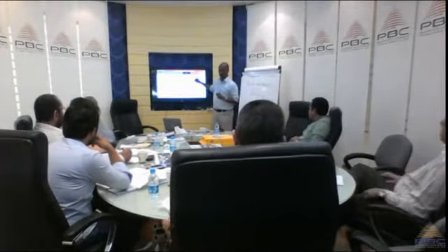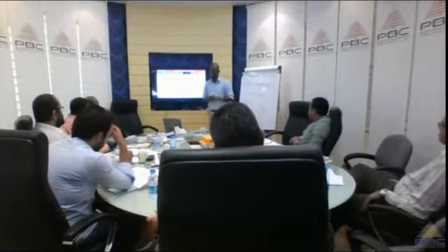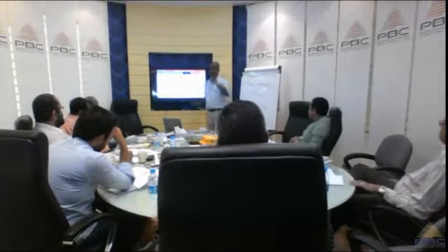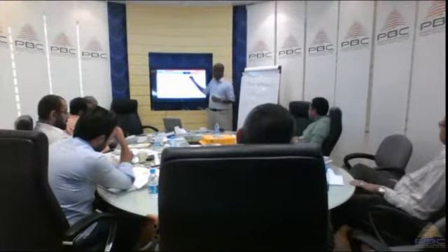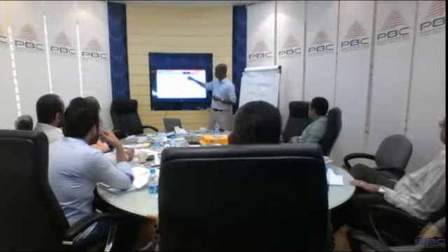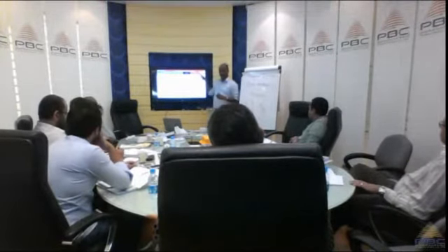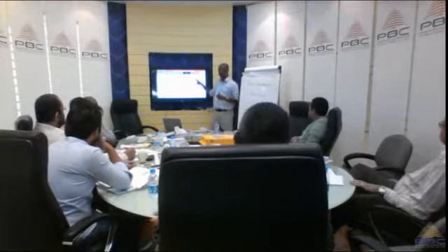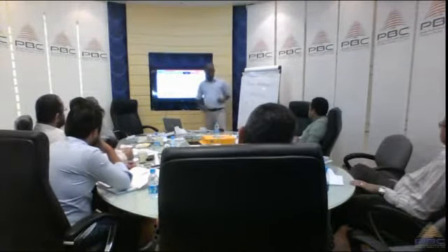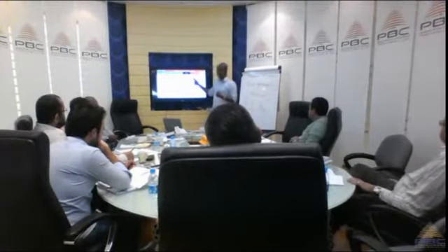So we say control scope, Bashmuhandis Usama, is where we control the deviation as a project team. And validate scope is done by the client. When we create the final deliverables, we send them to the client, and the client does inspection, validates the scope, and accepts.